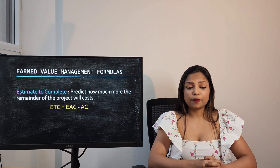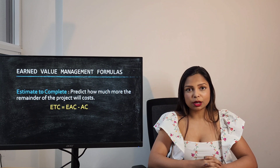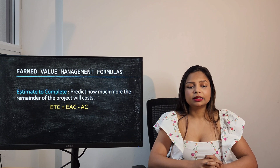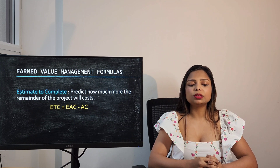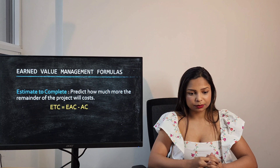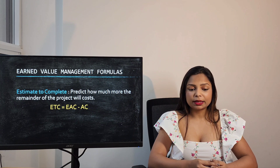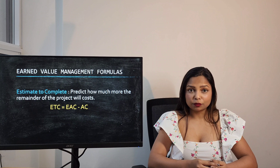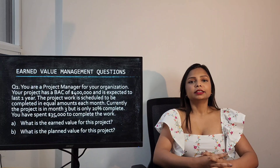Estimate to Complete predicts how much more the remainder of the project will cost. The formula to calculate Estimate to Complete is Estimate at Completion minus Actual Cost.